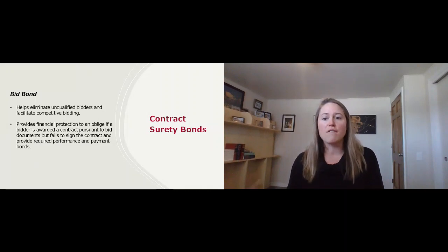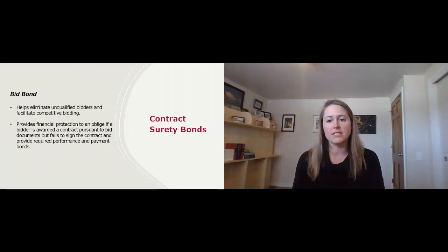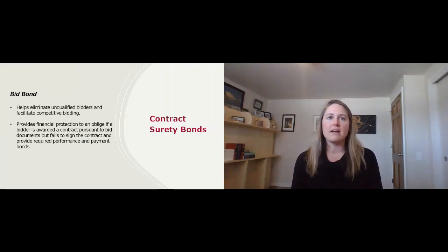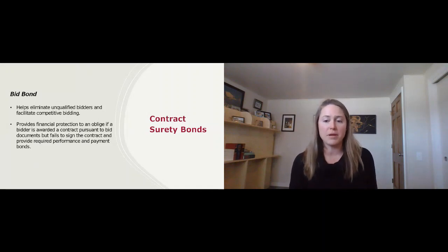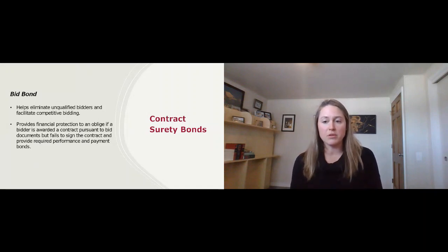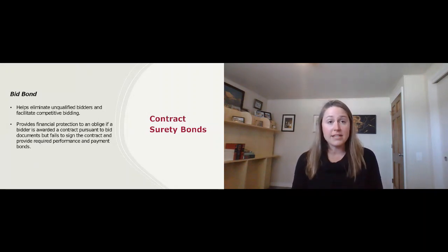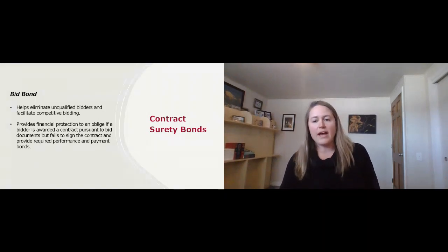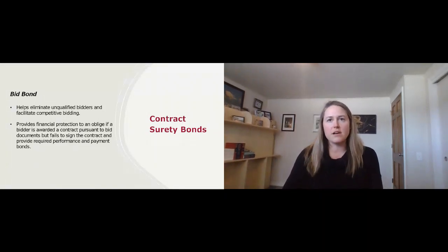Basically, you're affirming that you, as the contractor bidding on the project, have the required funds necessary to carry out the project. When you're providing your bid and you have a bid bond, you're ensuring that if you're selected, you will be able to enter into the contract at the bid price and you will actually be able to perform that contract. So it's kind of like a secondary way to pre-qualify the subcontractors on the project because they will have